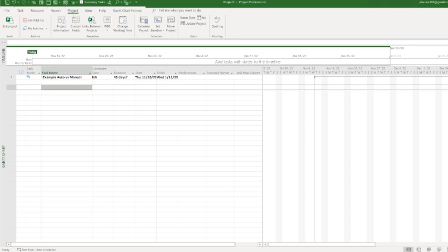Now, why are we doing this? We're pretty much making exceptions in the schedule that certain days are just not going to be working days. And that is perfectly fine because this is going to help as part of that calculation that we've been talking about, because you want to have that available and ready. Now, of course, we built this one year in, right? So we're going to pretend this is a one year project, for example. So you hit OK.